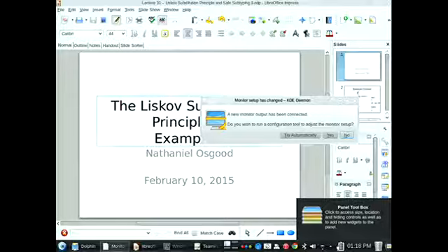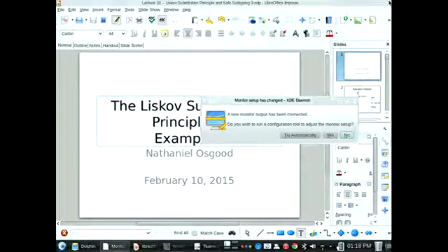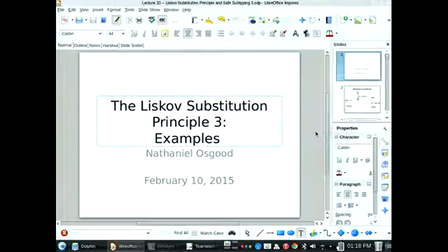20 hours, yeah. By the way, I'm really oversimplifying this, in the sense that one of the lessons coming out of estimation is you try to avoid point estimates, estimates that are just single numbers. You try to give range estimates that have some bounds of uncertainty. But just for the sake of this discussion, if you had linear dependencies, if this depended on that, then it's going to be 20 hours of clock time as well as 20 hours of work.